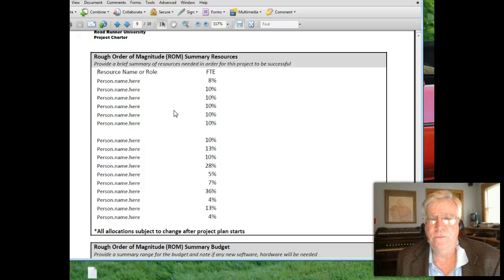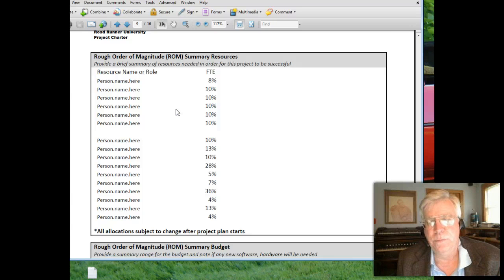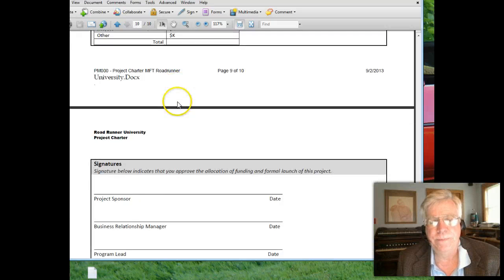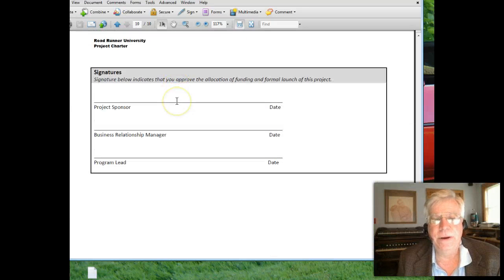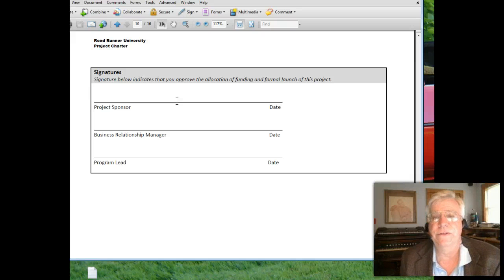For resource assignment, we used rough order-of-magnitude estimates broken into percentages of an FTE — a full-time equivalent — so we can figure out funding models for each person. Then we listed what hardware, software, professional services, and other money we planned to spend. Ultimately, the project sponsor, the business relationship manager, and the program project lead had to sign this document and say, 'Yes, this is the plan.'